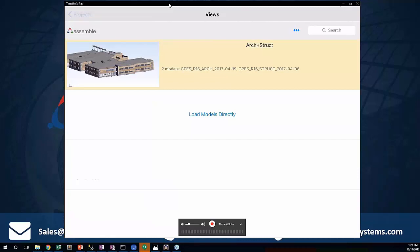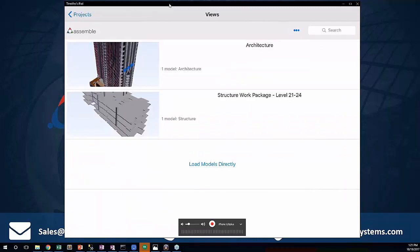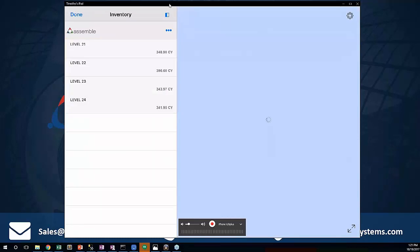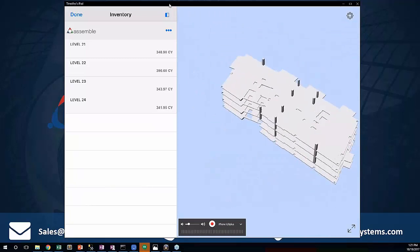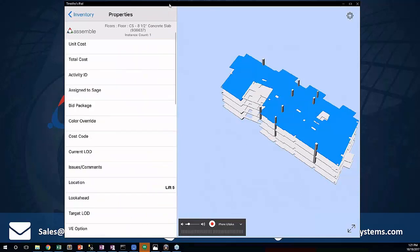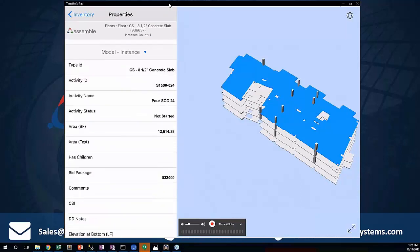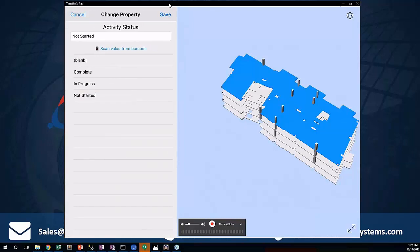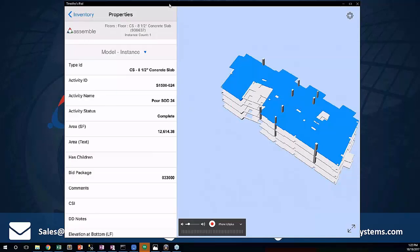I'm going to step back out into another project and talk about tracking work packages and installation information. Within here, I've got a particular work package for my structure, levels 21 through 24. I'll select that and it's grouped by level, giving me my components. I can select an object and jump into properties. Within this property, I can see that my activity status is 'not started,' and I can quickly choose from a list of values — I'm going to select 'completed.' Now this has been changed from not started to completed, so anyone else in the project has that information updated across the board.